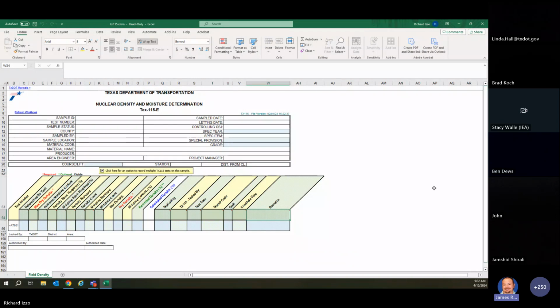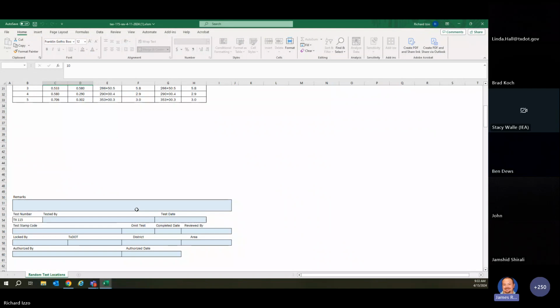At that point, when you run into problems, you're not going to pull material, go run a curve, and wait 3 days when you're doing some kind of repair. Even if you're having problems, nothing stops you from getting with your area engineer or assistant area engineer and saying, hey, the gauge isn't reading well, but proof rolling shows the results are good. You can zero out a density test and just say that you moved to accepting via proof rolling. As an engineer, you have the authority to do it.